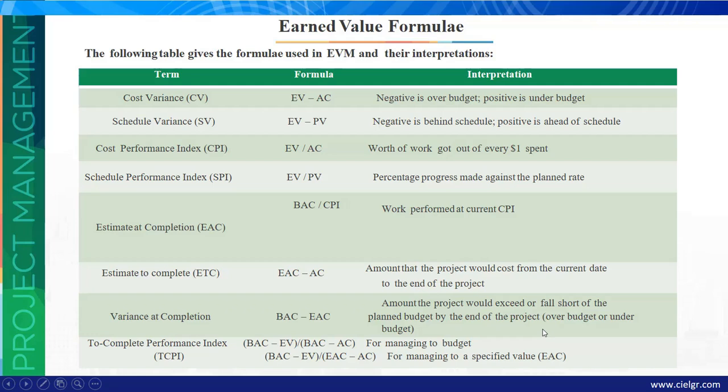And then there's now the TCPI, that's the to complete performance index. So what the TCPI now measures is, we now want to be able to determine, based on the results we've gotten, what will be the rate of performance from our workers in order for us to still align our project with the initial budget at completion or the new estimate at completion.